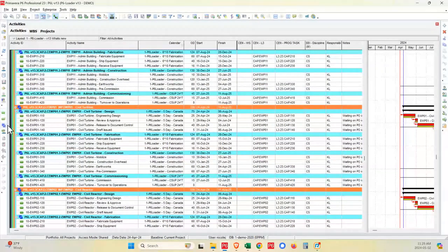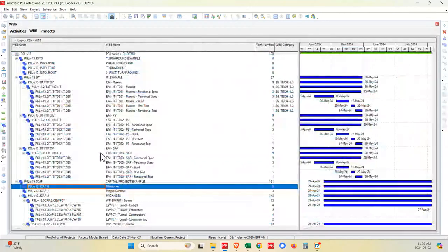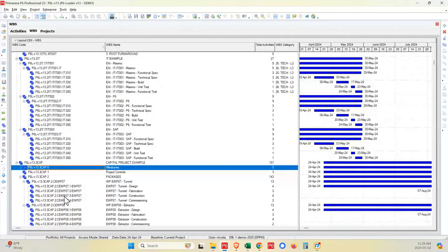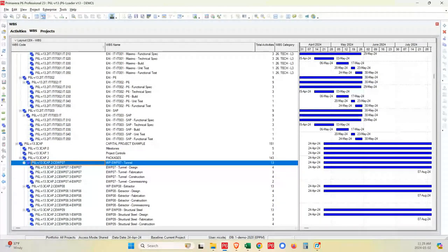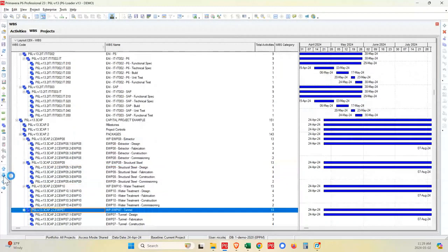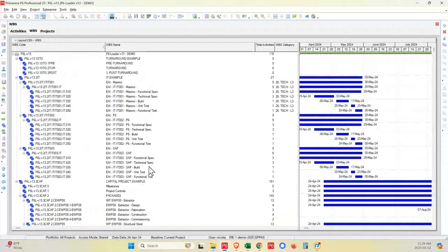This is so P6-Loader out of the box, WBS order control, you need to run that afterwards, okay? But it's done the heavy lifting for me. It's just that it puts it at the top. It's the way the WBS works, okay? So you just need to do one more tweak, pull those out and reorder them instead of bumping it with this arrow key, which will give you carpal tunnel when you got a big project.